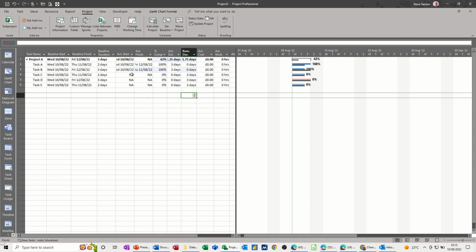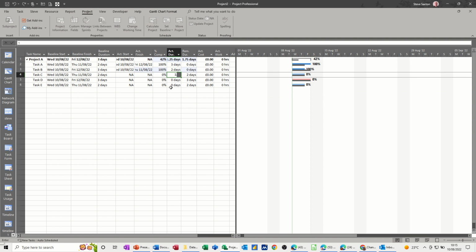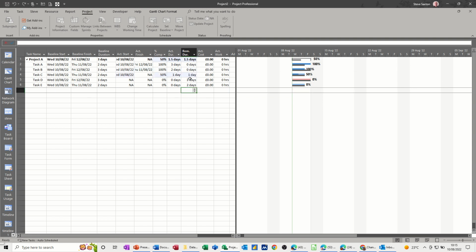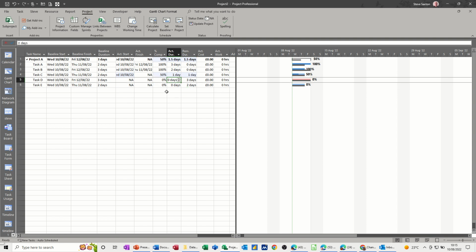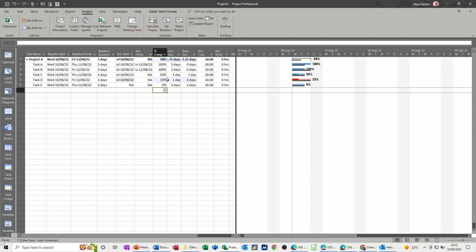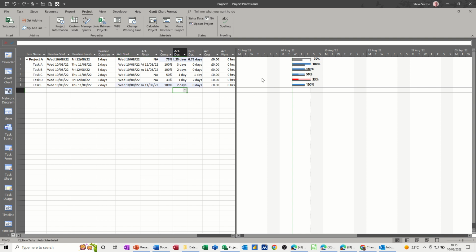Now let's just do another one. So that one, let's say that was supposed to be 2 days. Let's say we took 1 day, and there's 1 day left, so that's 50%. And let's do the same on this one. So let's say this took 1 day, so there's 2 days left, and let's say that's taken 2 days, so that will be finished. That's 100%, and that's how that tracking table works, and how the Gantt chart on the right reflects it. So what's the status bar about?